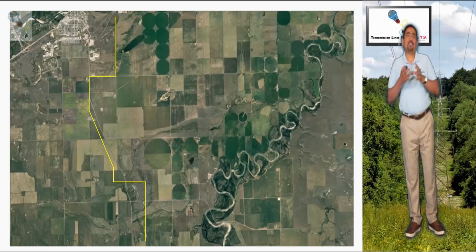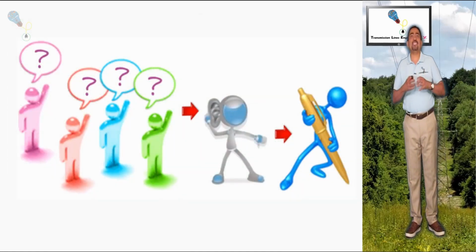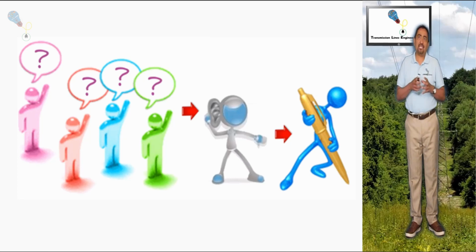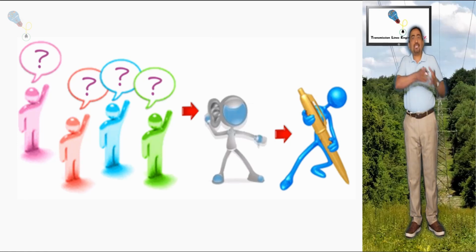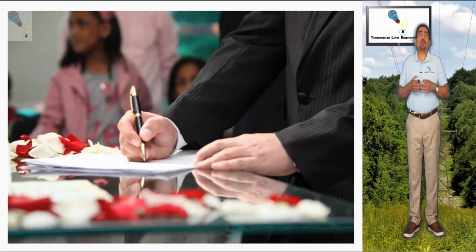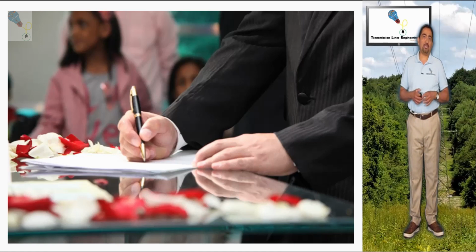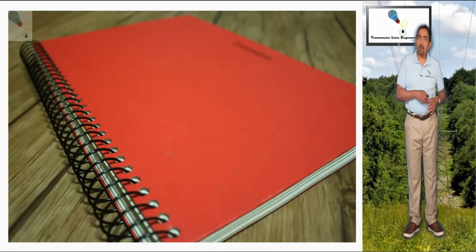Once having the final trajectory, the client will compile the needs of each affected owner in a document which must be fulfilled by the contractor to ensure that the commitments made between the client and landowners are met. We could call this document a design restrictions document or red book.